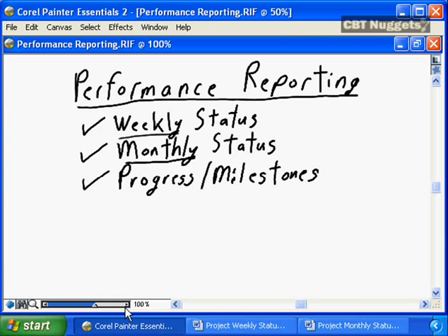So it is an interim, high-level, virtual milestone status report that says here are the key milestones, 5, 6, or 7 for your project, and here's how we're doing, so that other stakeholders, other people who are interested in the project, can have a high-level view of the project and of how well the project is doing, and more importantly, of when the project will be completed for the organization.